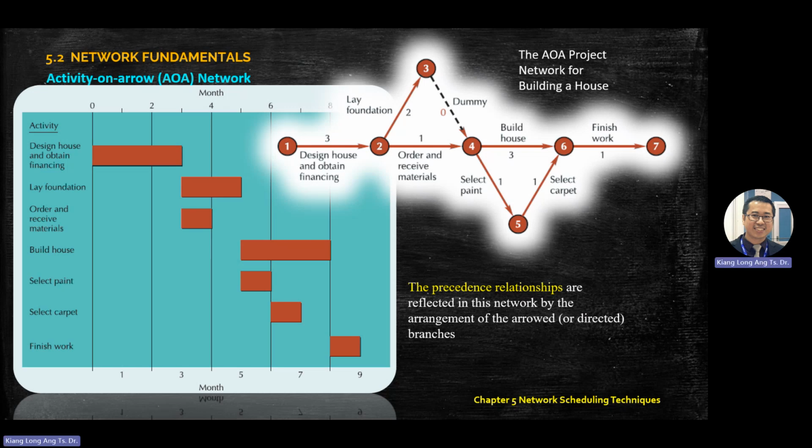A word here you will see in the test: precedence. Precedence relationship means you need to follow the sequence. What do I mean by pre? Pre means before. Precedence means before. For example, the precedence activities of laying foundation will be this one.